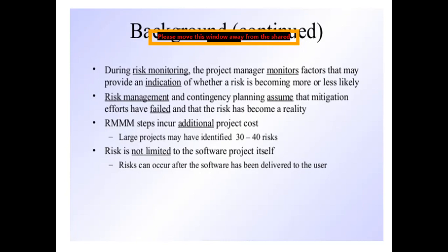Sometimes our management may fail, and due to that, the severity of the risk is enhanced. Another point: RMMM steps incur additional project cost. Whenever we use RMMM steps, there is an addition to the project cost. So the project cost will increase.